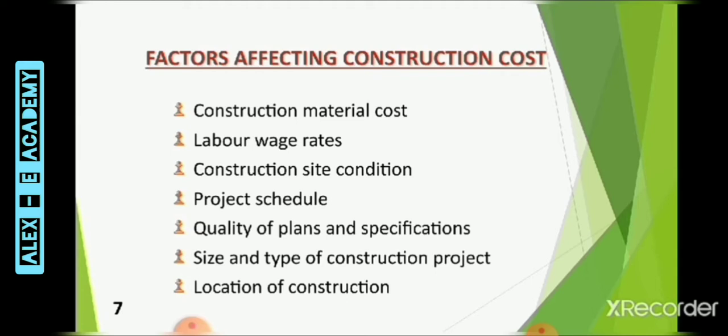The next factor is size and type of construction project. For a large construction project, local workmen may not be sufficient and more workmen may be required. This may incur extra charges, and the type of construction project where a specialized workforce is required also increases the project cost.